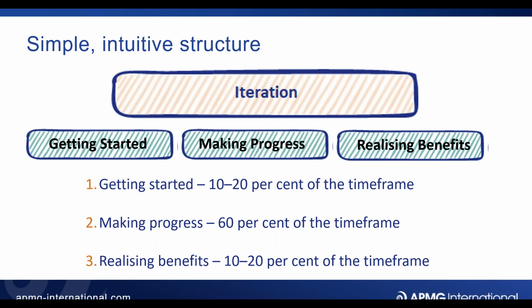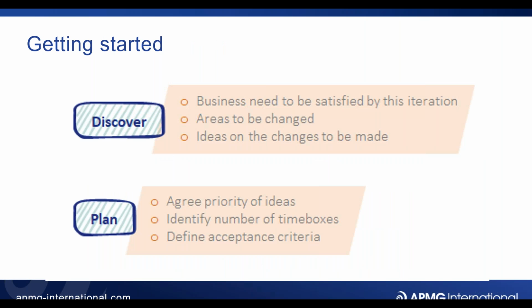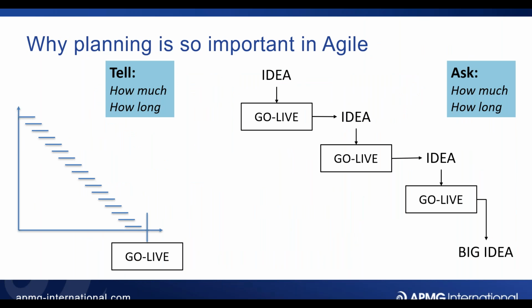And I alluded to this at the start, but certainly when we are going through the discovery of all the work we need to do, the planning bit is we have to agree the priority of ideas. And again, it's just a case of what we didn't do in a waterfall approach. So forgive me, I'm just going to go back to the waterfall approach for a moment. My priority in the waterfall approach on the left there was to make sure that I identified every single piece of work, and I didn't need to think too much about how to prioritize it, because the prioritization rule was: what do you need to do first to enable you to do the next thing that enables you to do the next thing? So how I organised the work was always based on this principle of the logical flow and the dependency from one thing to the next. Lining up things all based on interdependencies is how you plan in this way.